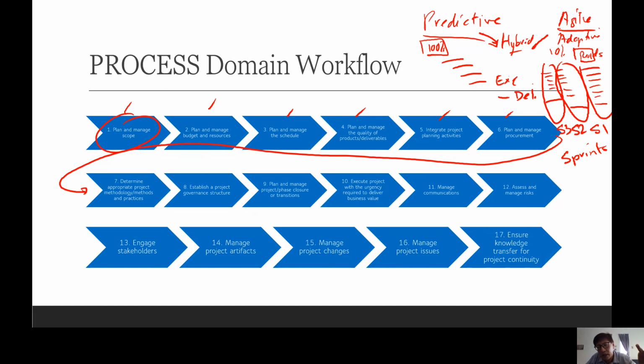Against the vendor's availability, or impromptu availability. What if the wallpaper guy says, no, I'm not free also? Then you're only left with carpeting. So the carpenter lays the carpet, ensuring there is an extra protective layer, because people will step on it when they do the cabinet and the wallpapering. So we're still flexible here. We're still able to be agile, to be adaptive. Although we would like it to be predictive, we can flex the muscle a bit.